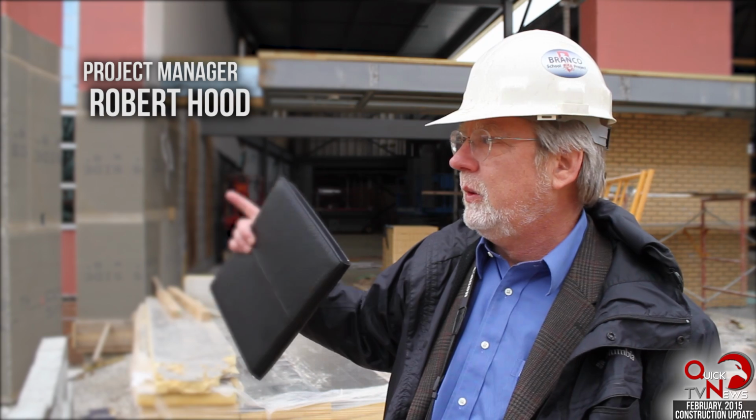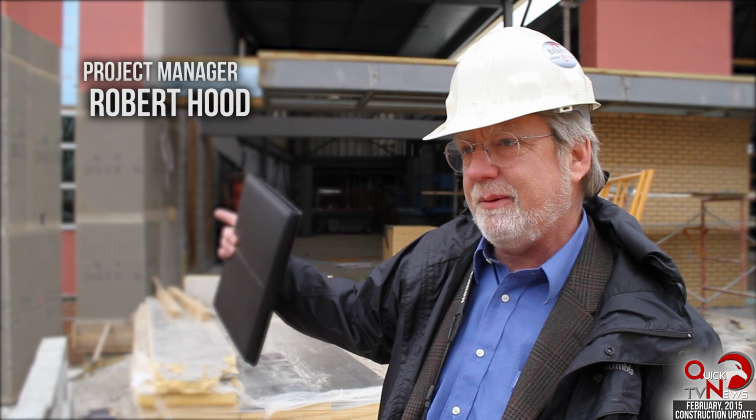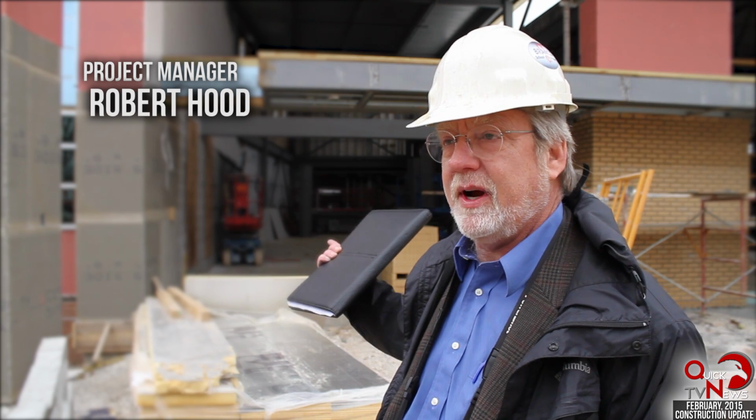This summer, in less than 2 months, we added this special education room. We renovated a new admin area. We reworked the entire east parking lot for the buses because we cut off the old parking lot for the FEMA shelter. We added a new parking lot, all new infrastructure, new technology upgrades, not only for this addition but for the school itself. We sprinkled over 75% of the interior of the building and tore out probably the oldest portion of the building that there was, and a portion of the corridor at the auditorium, and rerouted the traffic into the auditorium to where it could be used during the construction, all before school started. That doesn't count the temporary parking.